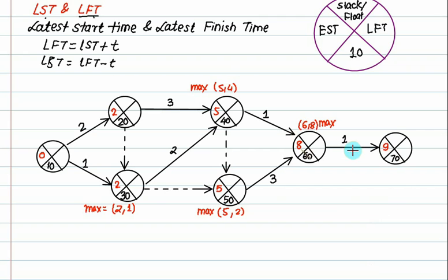Is this 9 coming in? So you draw the double arrow. Now, is this 8 coming via this path or via this path? Mark it dark. Now, is this 5 coming via this path or via this path? Mark the double arrow. Is this 5 coming via this path or this path? This path. And this 2, is it coming via this path? Can you identify how you are getting 9? So 9, and this one is 8. How are you getting 8? 8 minus 3 is 5. 8 minus 1 is 7. It means this path.